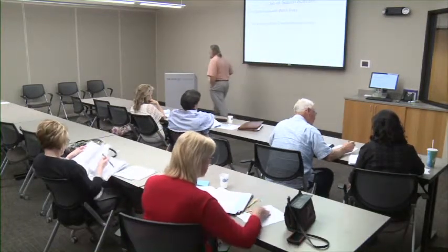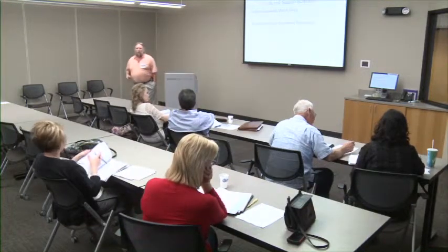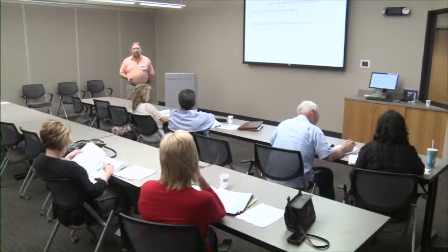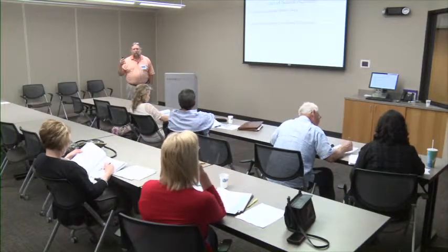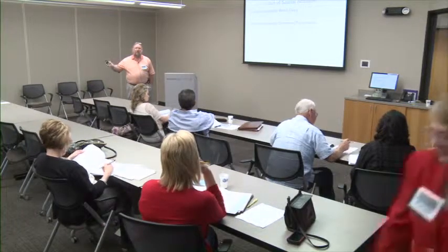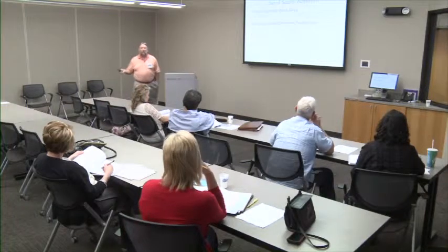We adjust the activity duration. This is what's preferred. It really makes more sense to say, you know, we're just adjusting. We're going to put 5 days in because that's how many days we think it's going to take. But instead of putting 5 days in, I'm going to put 3 days in because that's all I'm going to work, is 3 days a week instead of 5.